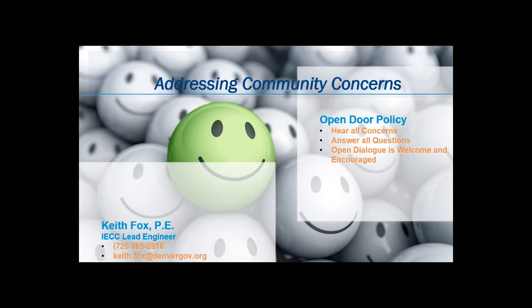Keith, was there a phased approach to requiring the checklist? No, there's no phased approach. We're asking for the checklist to be submitted on all of the projects for new construction buildings, new multifamily residential buildings, and the commercial tenant finish projects over 10,000 square foot. So if you've got a tenant finish project less than 10,000 square foot, you do not need to submit the checklist, but there is not a phased approach to bringing that in. It will be required on all projects starting January 4th.